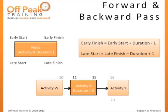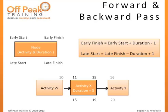Likewise, late start represents the latest an activity can start without affecting the planned project finish date. Late finish will be the end of the day prior to the earliest late start of its successors. In our example, the late finish of activity X's successor is the beginning of the 20th day, so activity X must be completed no later than the end of the 19th day. Late start can be calculated by subtracting the duration from the late finish and adding 1. In this example, we take 19 minus 5 and add 1, which gives us 15. Looking at activity X, the earliest it can possibly begin is the 10th day, but it can start as late as the 15th day without causing the schedule to overrun.